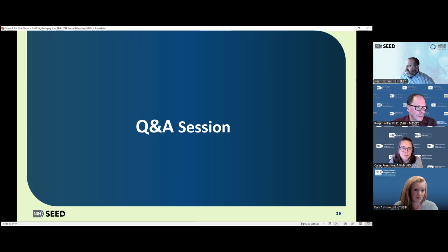I am seeing a couple of questions about the COR. Callie, can you just clarify the role of the COR and differentiate that from the other people working on the project? Yeah, absolutely. So your COR, the contracting officer representative, is going to be your technical point of contact. They're the government official that will help with technical progress and acceptance of the deliverables, any technical issues that you might have, working through the statement of work and those requirements.